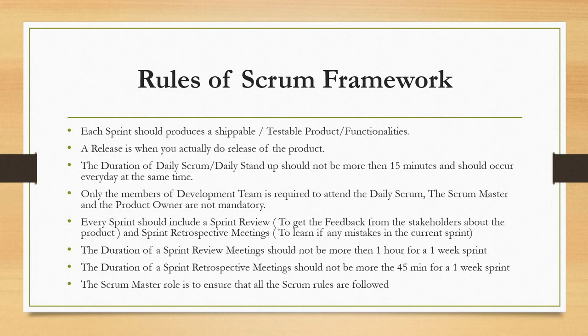A release is when you actually release the product. Next, the duration of the daily scrum, or most commonly called daily stand-up, should not be more than 15 minutes and it should occur every day at the same time. Next, only the members of the development team are required to attend the daily scrum. The Scrum Master and the product owner are not mandatory to attend.